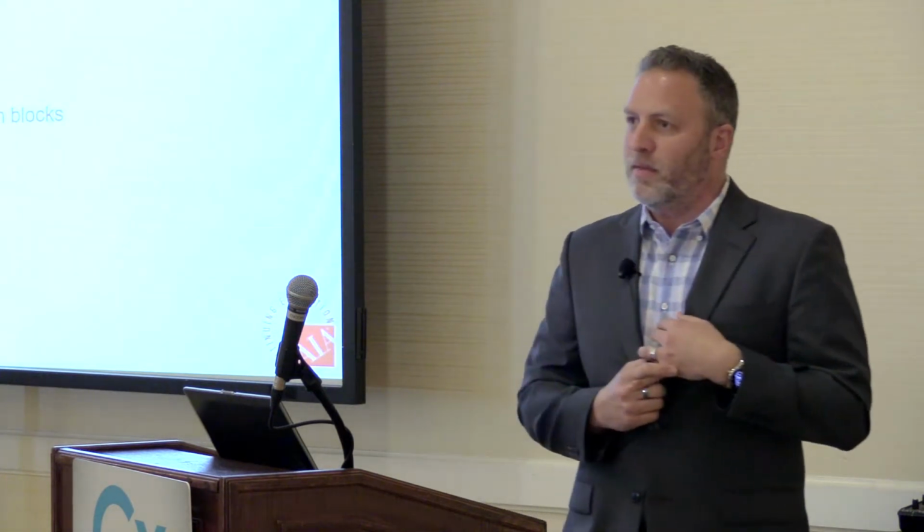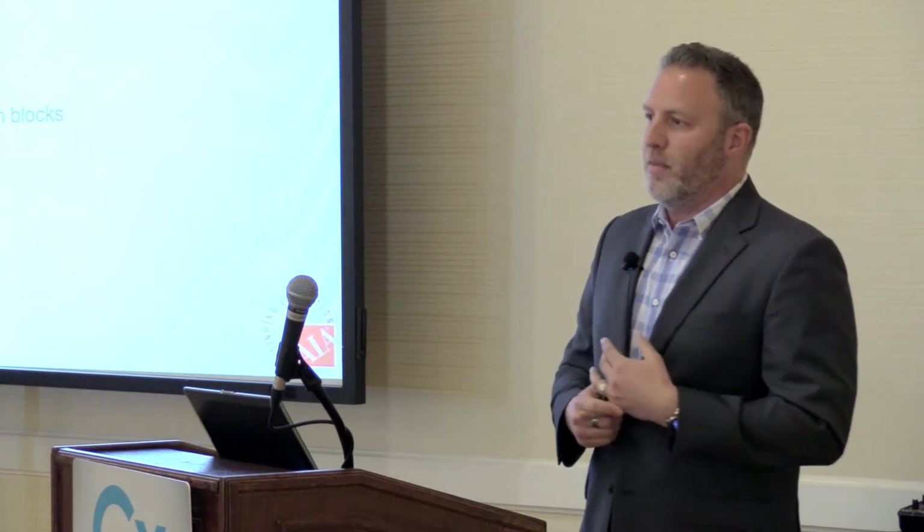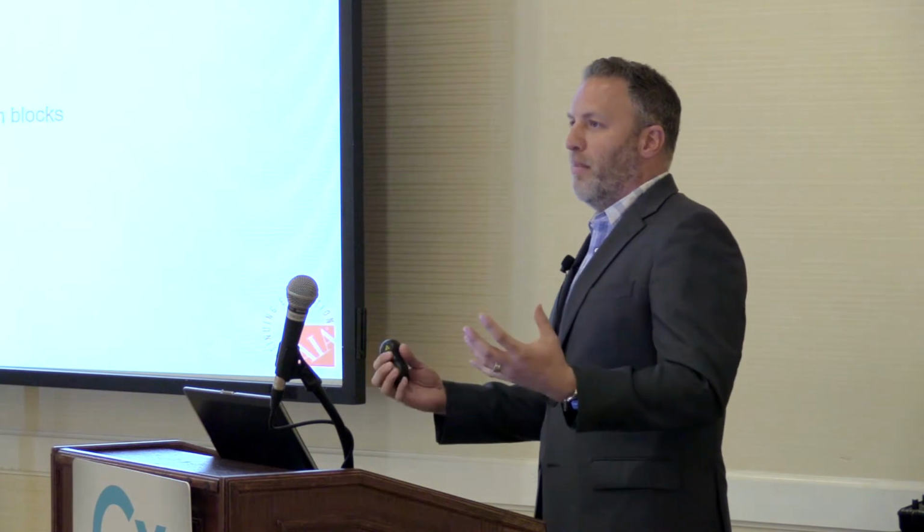This is the module itself getting built. So you have submittals, or you should be expecting submittals. What's your role going to be on that submittal? Again, if we're talking about a template and a known commodity, Emerson or Schneider aren't going to want to spend a lot of time waiting on your comments. They already know what they're building. They just want to get it built into the site as fast as they can. So you have to react quickly. And again, where do you define your scope?